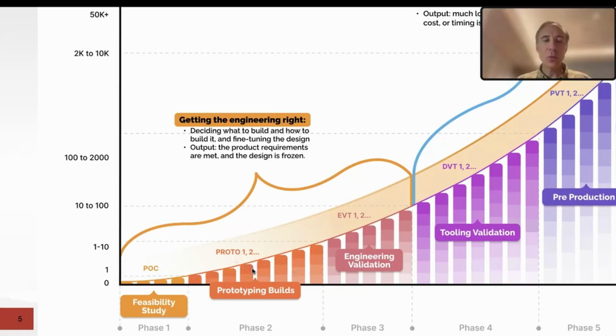Now let's go into the prototyping iterations, which is what we call phase 2. Basically, all of the deliverables of phase 1 need to be taken further, right? So the initial risk analysis will need to be a bit more beefed up because the designers have had a lot more time, and the people doing sourcing also have had a lot more time to think about things, right? List of issues, compliance plan, reliability plan, etc., all need to be a bit beefed up. That's a very legitimate assumption.